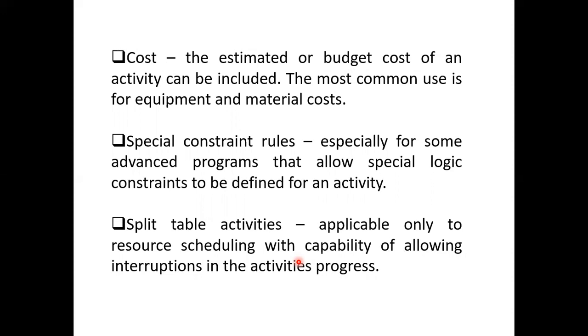So basically what we're saying is, for the computer to work for the first time, take care of the project data, the current information, very, very important for you to base the schedule on, and also resource data. If you want to produce a budget or come up with a schedule, you need to have the resource data inputted. Activity data, very, very important. It complements the project data, because with activity data, we're talking about those activities that will be done on the project, so they need to be entered as they are.